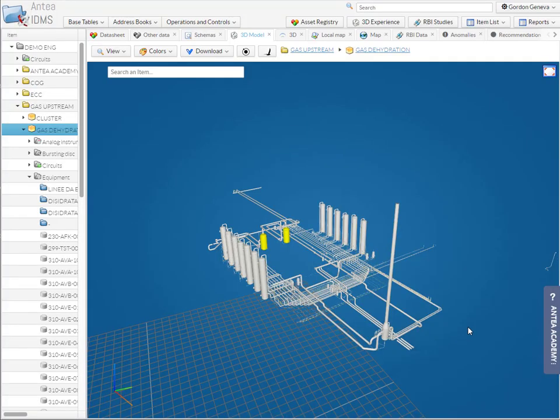Another good example of how we can optimize our planning and maintenance scheduling activities when you're working on a lot of different equipment in a small area, such as in a turnaround situation, is by highlighting those assets in a 3D model. So that way a planner can actually see where the assets are, how he can stage equipment, and also how he can mitigate safety risks by stacking too many contractors in a small area at the same time. Yes, this is a great example.